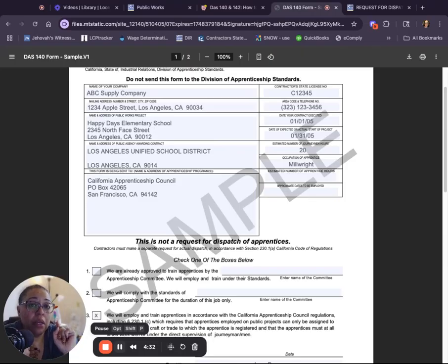We would ask them what they're going to use on the project: carpenter, plumber, electrician. They might have multiple. And what are their estimated hours? How many hours in total for that classification do they think they're going to use on the project? They may not know. They can guess. Give me an estimate, a number that's close. Don't say 5 when it's 500. Conversely, you don't want to say it's 20,000 hours when it's going to be 200. So ideally that estimate or guesstimate is pretty accurate within a certain range.